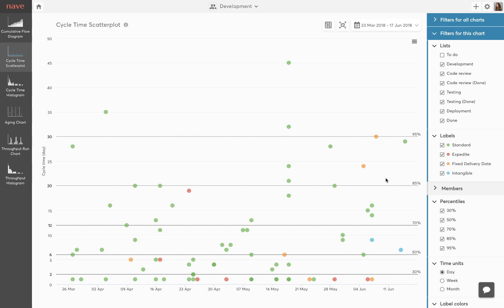Cycle time is the total time any task remains in progress. It is the elapsed time from the moment your task is put in progress to its completion. Each dot on the cycle time scatterplot represents a completed task from your Kanban board.